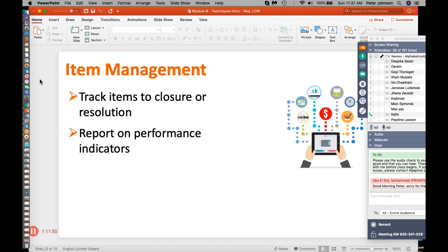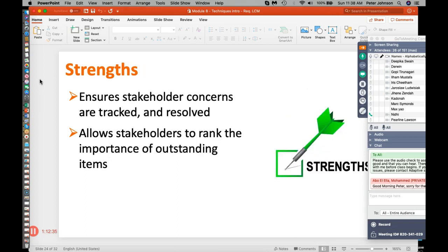How I do that, again, depends on the complexity of my system and my tools. I could do something as easily as put it into SharePoint, which does a great job doing item tracking. Right? Or I might have something more enterprise-wide that requires a more sophisticated type of software to manage. Maybe I'll do something in a Word document or an Excel spreadsheet. It's really simple. Right? More often than not, I'll have some type of reporting mechanism that tells me what's my mean time to failure, or my mean time to repair, or things of that nature. How many items were resolved within an hour or within 6 hours? That might be important information for me to help monitor item tracking and see that things are being taken care of, and to look for ways to improve the process behind it.